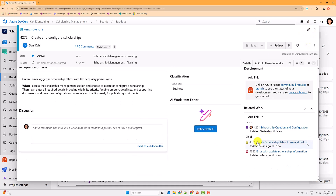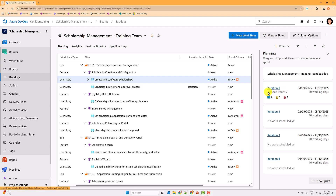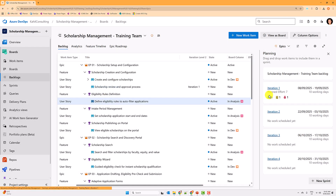If I now drag and drop a user story to Iteration One, you'll see a quick view showing the planned effort got added to seven, with two user stories, one task, and so on. You can drag and drop items to your iterations this way. I now have three user stories — that's enough. The plan effort hasn't increased for the last one because I haven't specified story points for it.